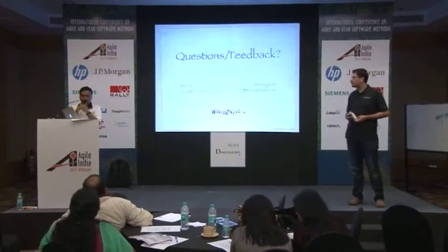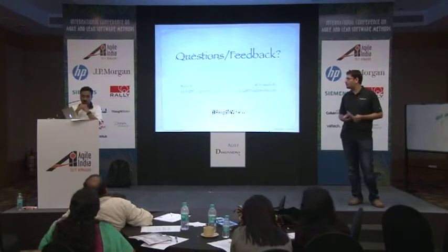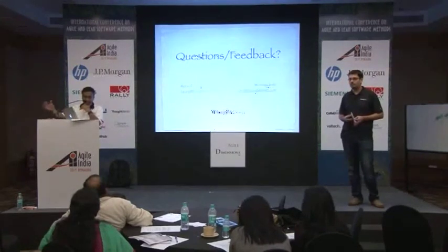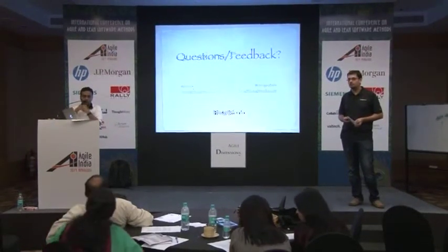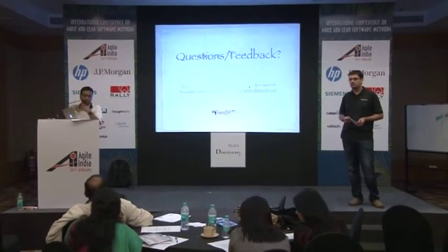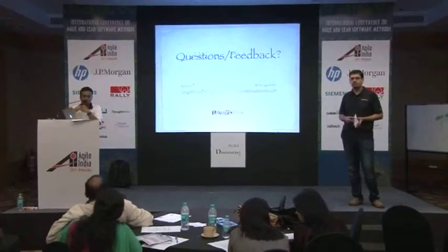Yeah, but end of sprint is a notional thing, right? I mean, you can just decide that 8 a.m. US time is when the demos will be, and whatever work has got done till that time on a Monday morning is what counts as a sprint on both sides.